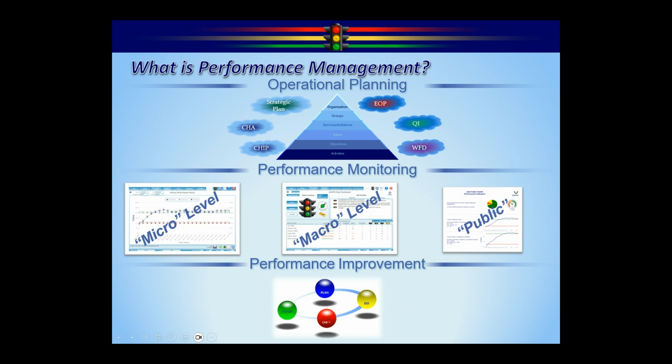So when we get to the check phase, this is where we're going to use the performance monitoring. What we're doing in the check phase is comparing our plan to our actual, and we'll go down and look at examples of that in here. Without the check phase or without the performance monitoring, you can't do a check phase. You don't have anything to compare to your plan. So that's why this is kind of critical, what we're talking about today.